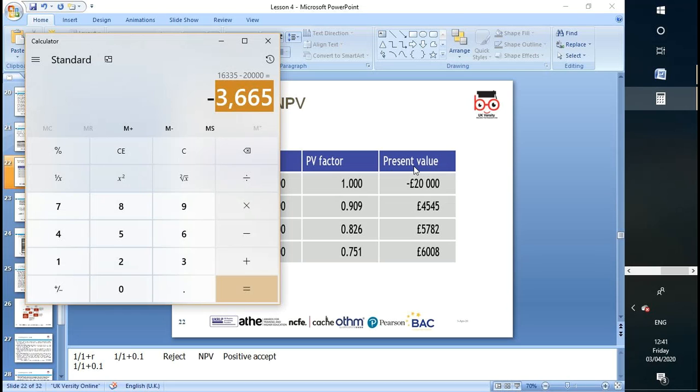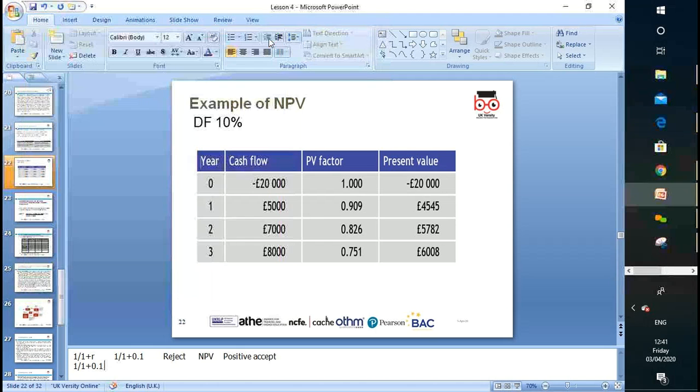Okay, that means the present value you have to prepare before the project? No, you can estimate it. Before, we can estimate what the benefit will be of this project. We can appraise it. So according to this project, I'm not going to invest, because my NPV is coming negative. So if my NPV is positive, I accept it. Otherwise, I reject it.